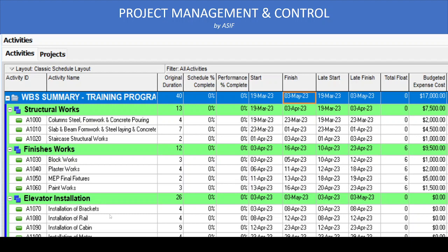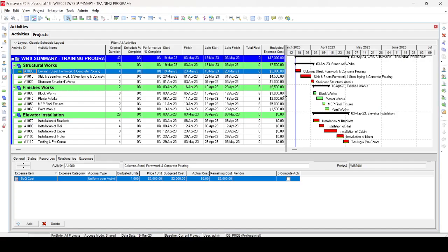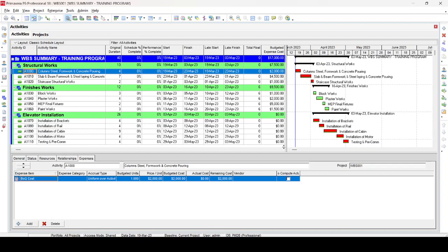So once we add WBS activity here, this WBS activity cost and resources will transfer from this WBS Summary activity to this WBS level. So let's start in the project itself. Now we open the program, a simple program with few activities. We have construction activities and then elevator installation. You can see that all the construction activities are assigned to the cost and not the elevator installation. The elevator installation is a single line item in the BOQ without any breakup.